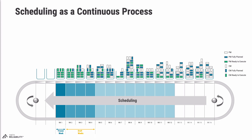Before the frozen weekly schedule is issued next week, the planner needs to confirm to the scheduler — or in the CMMS — that the work order is ready to execute or not. If not, the scheduler will need to defer that job from week 2 to say week 3 or week 4, and bring a ready-to-execute green job from a future week forward. So, assuming we swap that fully-planned-but-not-yet-ready job in week 2 with the ready-to-execute job in week 3, week 2 is good to go just in time for the weekly schedule review meeting.